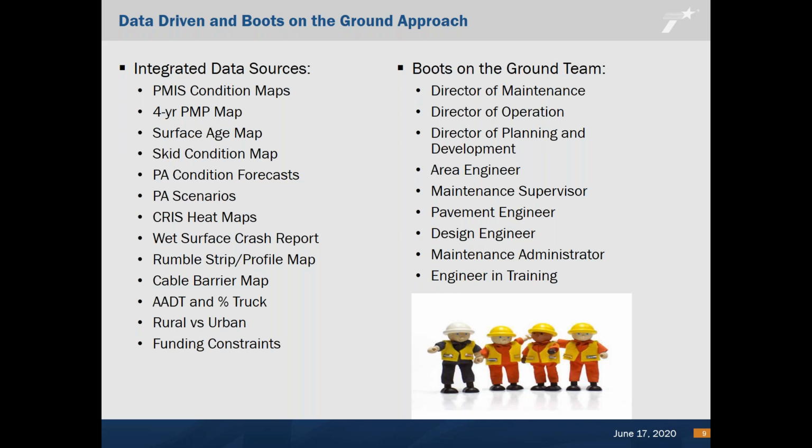During this van ride, they will visit all the project sites, take notes, and discuss project scopes, anything that needs to be rescoped or added or removed, or a project moved to future years. This serves as a great opportunity to bust the silos of the different offices and bring everybody to the same page. This is a very important communication tool that serves really well in the project decision process.